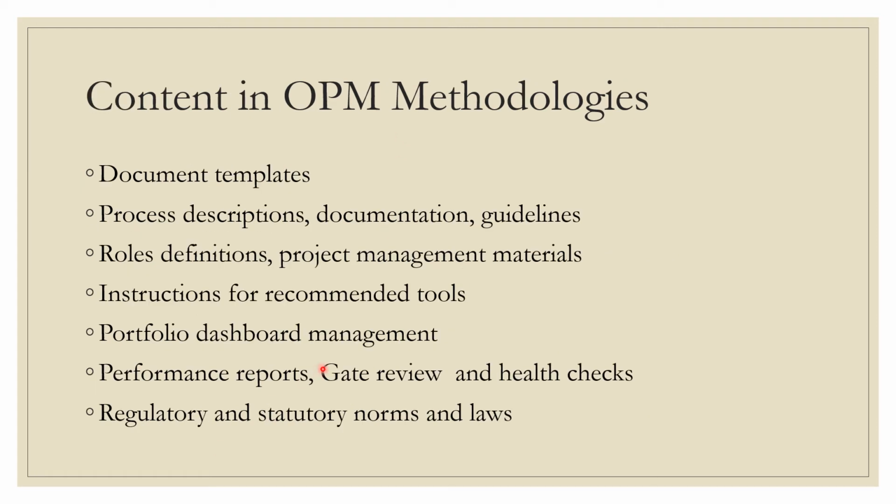And what is the content in OPM methodologies, right? It can be document templates, process descriptions, documentation and guidelines, role definitions, project management materials, instructions for recommended tools, portfolio dashboard management, a very important one, performance reports, gate reviews and health checks, regulatory and statutory norms and laws. So these are the major contents in OPM methodologies.